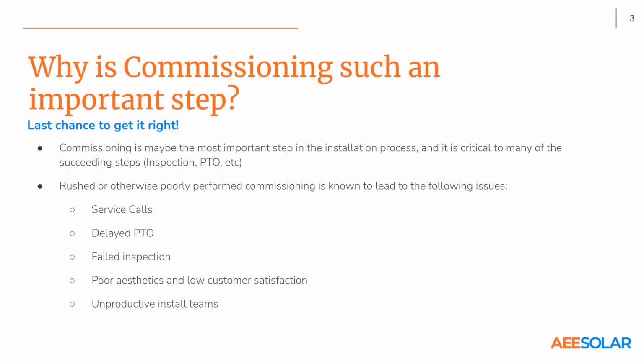If you don't do it right, you don't pass go, you don't collect $200. Similarly, rushed or poorly performed commissioning can lead to some really bad outcomes: service calls, additional truck rolls, delayed PTO, and as we know, if you don't get PTO, most of the time you don't get paid. So really critical there.